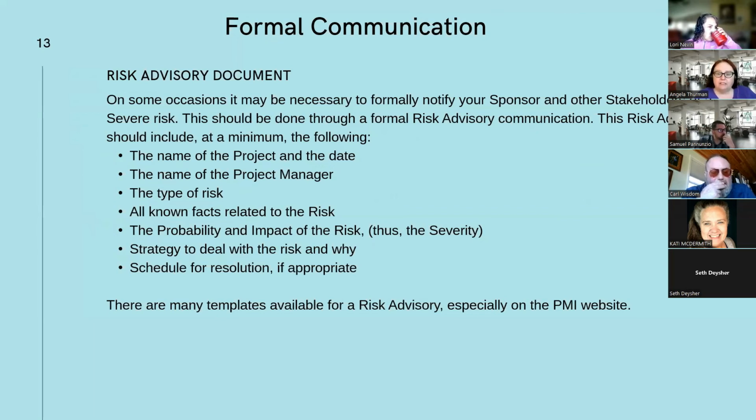When you have a risk that is more severe, I would say where the severity is more than 15, so your probability times your impact is equal to 15 or more, I would recommend a formal communication to your sponsor and possibly other stakeholders. There are lots of templates available for this. If you'd like, I can send you a template.